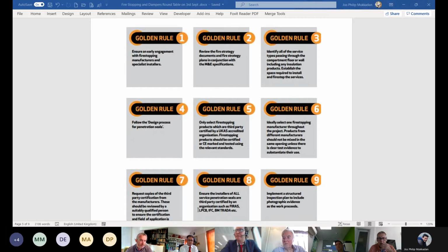Things like, always make sure the appropriate contractor is responsible for the penetration seal, because a lot of fire rated duct doesn't need a fire stopping company, as again it's a penetration seal. So they're slightly different. I don't know how you want to tackle that one.